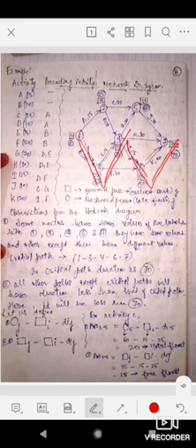So what does it represent? Some nodes have the same value in both labels, like 1, 3, 4, 6, 7, and the others except them have different values. So it is a critical path. We can find the critical path by this technique also. What is the critical path? The critical path is that path which gives us the minimum time required for the completion of the project.